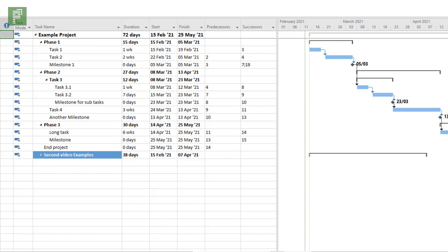You might, for instance, have these different calendars to support specific scenarios, where you would have office work continue, as if there's nothing wrong, but outside it might be freezing or there might be something else hindering you doing construction work. So you will need a construction stop during, well, it's freezing here now in the Netherlands, so during freezing periods.